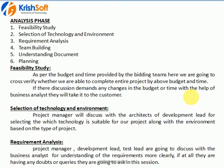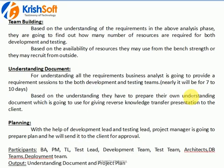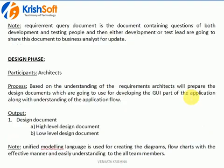Then the planning phase starts. The team plans activities like the development plan and testing plan — how much time development will take and how much time testing will take. The project manager, with the help of the development lead and test lead, prepares a combined plan and sends it to the client for approval. Based on any concerns raised by the customer, the team updates accordingly until they get the sign-off from the customer.